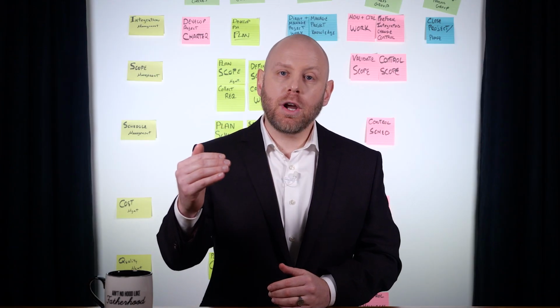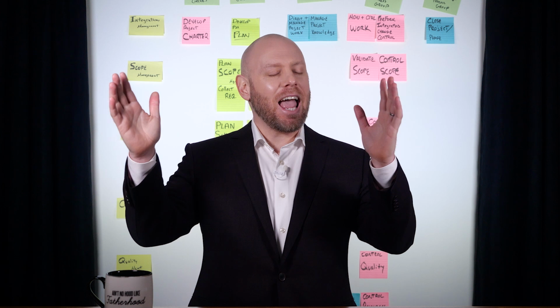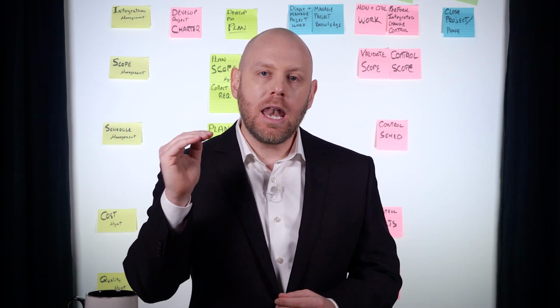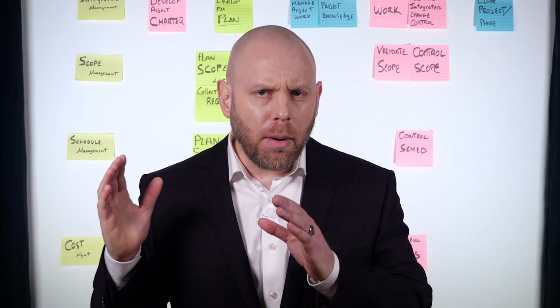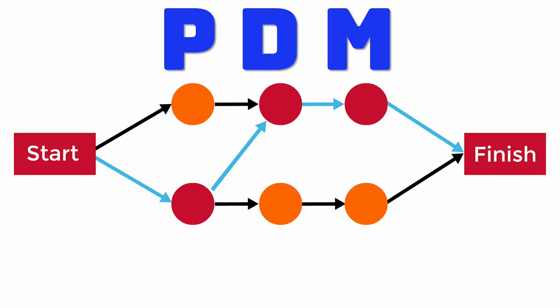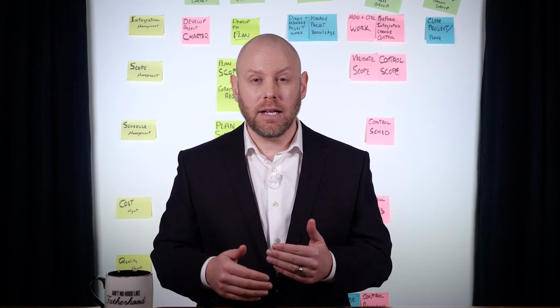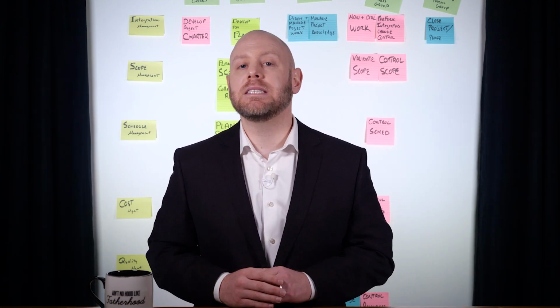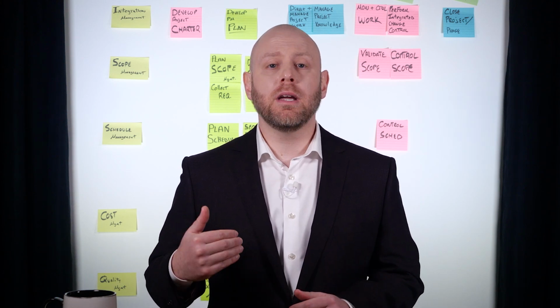We take everything we've created and used up to now, including our best friends, say it with me now, Fs and OPAs. We take all those references and we perform a schedule network analysis. That is where we create a node diagram, the boxes with the arrows, and map out what needs to happen when. So please refer to your handout for reference on how these are laid out. Critical path methodology uses this diagram to estimate the minimum project duration and the amount of flexibility in the schedule model. Exploring critical path in depth is beyond the scope of this course, but will be covered in future offerings.